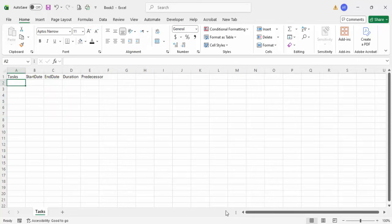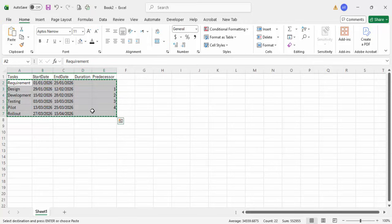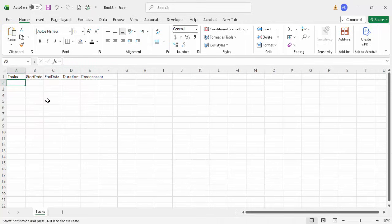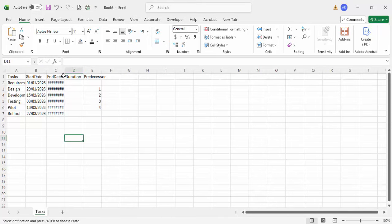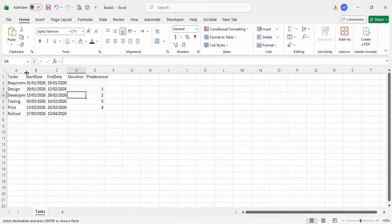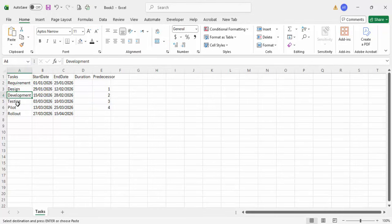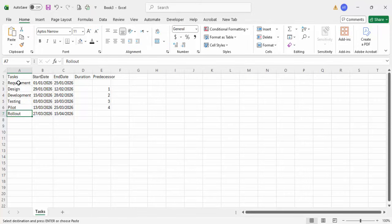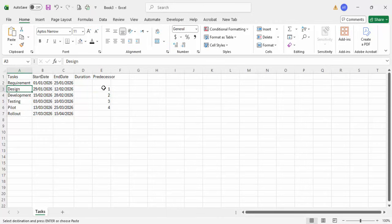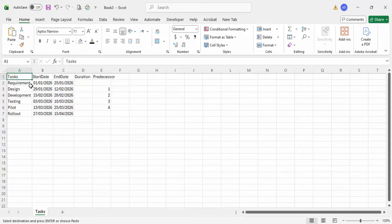Let me paste that information here. You can see I've got the tasks: requirements, design, development, testing, pilot, and rollout. In project management, the predecessor means a particular task — for example, design will not start unless and until requirements are finished. Similarly, development cannot start until design is finished. That's the reason we are putting the predecessor column here.